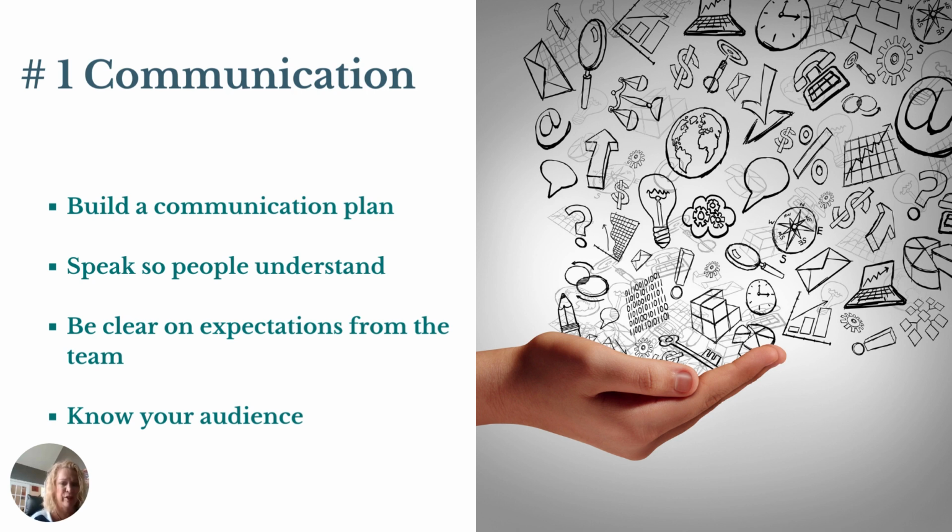Also, when are you going to send out this communication, and how? What is the channel that you're going to message the people about whatever it is that you're going to message them about? Is it going to be through social media? Is it going to be email? Is it going to be on instant message, a meeting, a memo? However you want to send this message out, you need to have that on a plan, so that you know when, what, how, and who your audience is. So just remember the when, what, how, and who for this section.